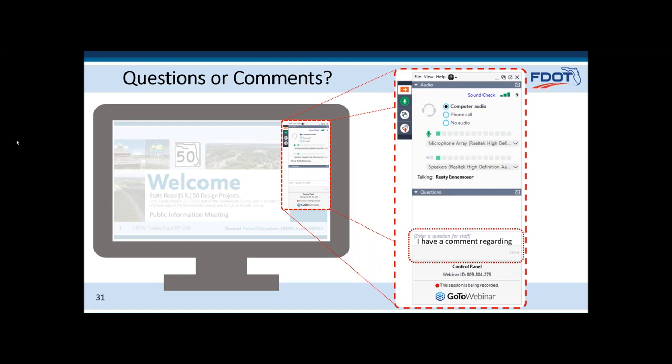As far as the divide between segment four and segment five, it's 0.4 miles into Lake County. But the way we have the project set up is the right-of-way will be taken through to property lines so that they're only impacted once. So if you're right on the border, you're most likely going to have your right-of-way acquired with the Dash 5 project the way it stands right now.